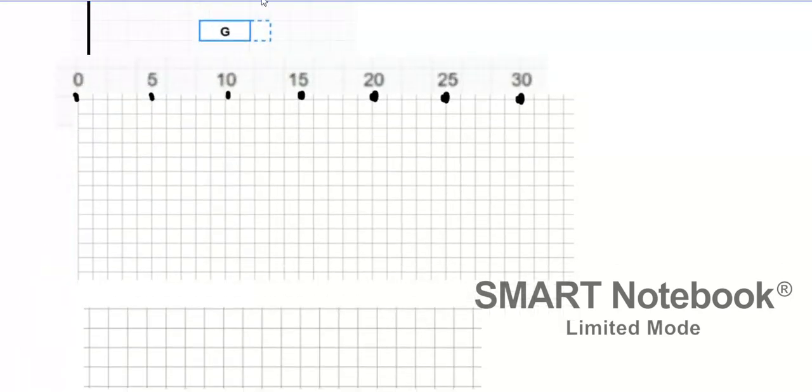What's the first thing in the critical path? Go on, what is it? What letter? B. How long is B? 0 to what? 0 to 3? Okay, 0 to 3 is B. What's the next one? C, which is what? 3 to 11? Okay, C.